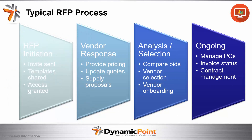Looking more through the process — what is a typical request for quote process? The first step is initiation. I'm going to initiate an RFP and invite prospective vendors to participate. I may share templates with them and give them access to our portal site so they have a location to submit documentation, share information, and overall manage the entirety of the process.